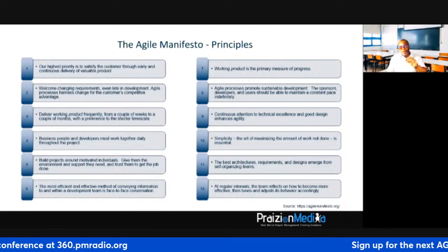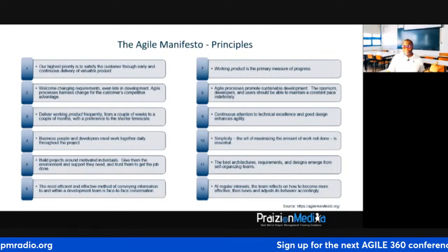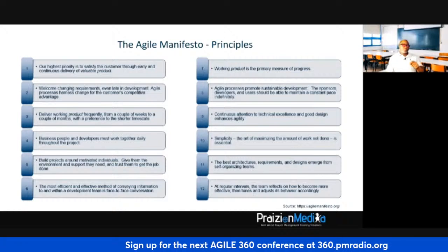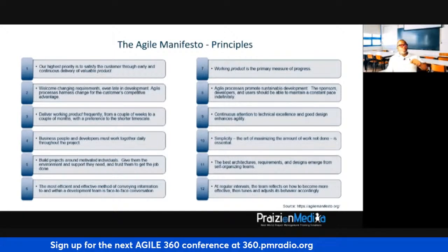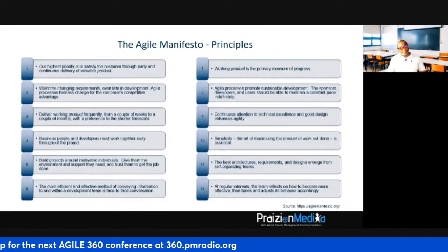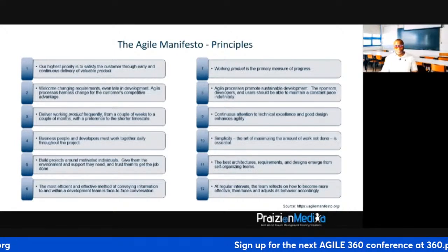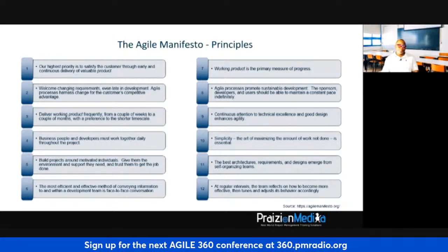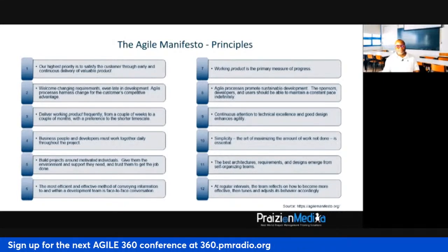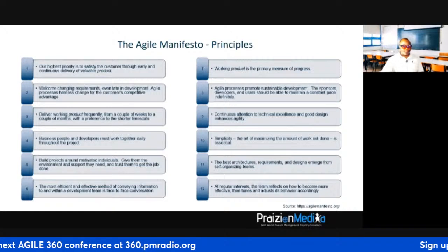So you look for one or two, or maybe more items that are discovered that you can improve on. Those could become backlog items for you to work on for the next sprint. And in the next sprint, you take account: these things we were working on, did we really get better in our process? Did we improve? Questions like that. So it's more like an unspoken retrospective. Does that make sense? Yeah.